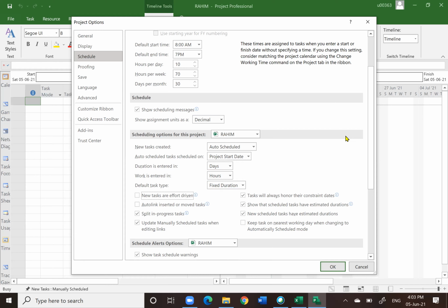But on the other hand, let's say we fix the resources. In most cases, this could be happening on our construction site. For instance, we only have one tower crane. Why not 2? Why not 3? Well, because we are using what we call the fixed unit concept, because there is no space available. We can only put one tower crane there.